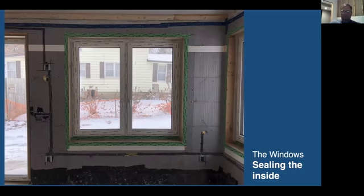If you can hang there for a second, Steve. One thing that's noteworthy in this picture, you can also see where I routed out all the walls for the electrical conduit to be run around the perimeter. That's one step that, if you have the electricians doing it, you're going to pay a lot extra. And as the general contractor on the site, it gave me an easy task to be doing while other people were doing work, monitoring but staying active.